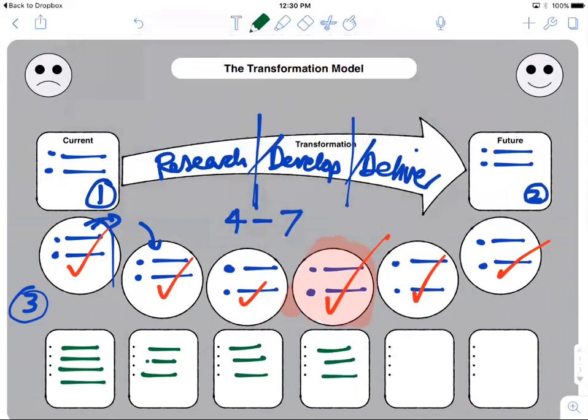It's also sometimes useful to apply the project triangle of time, money, and outcome to each of the milestones to check the priorities, which is what's most important for each milestone: time, the resources, or the outcome. And it isn't necessarily always the same for every milestone. That top-down flowchart or the transformation diagram, if it is turned on its side, basically becomes the foundation for a Gantt chart. It's a really powerful tool, great for group work, great for individual thinking, even on small projects, certainly on large projects. So I'd really encourage you to try and use it, become skilled with it, and have fun with it.